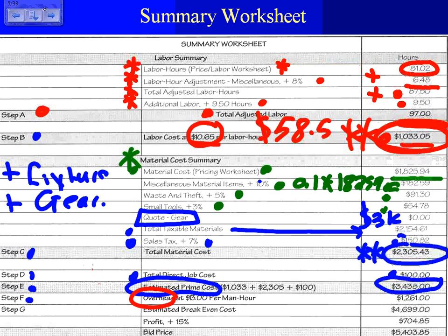Two ways of applying overhead. One is add a $13 per hour or percentage. Percentage, they suggest 20, I think 30 to 40% on your overall value, the prime cost, as your overhead. If you are a CA Electric and you're running your business from the back of your truck and your basement, your overhead is going to be as close to zero as practical, right?